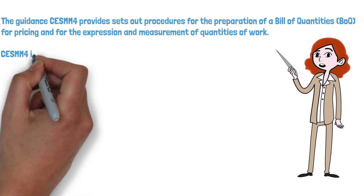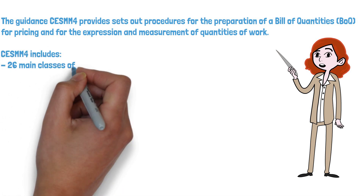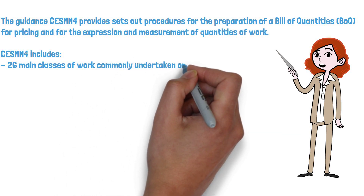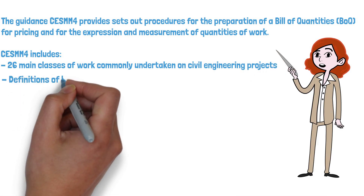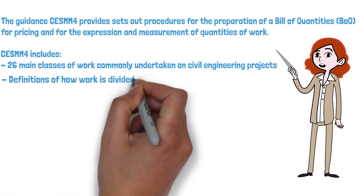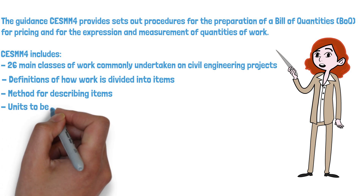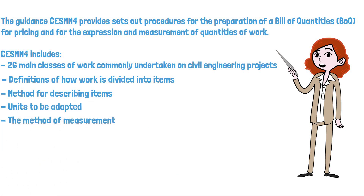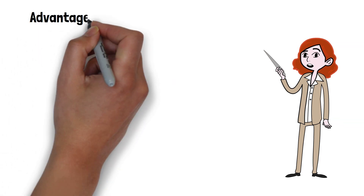The classification system in CESMM includes 26 main classes of work commonly undertaken on civil engineering projects, and includes definitions of how work is divided into items, the method for describing items, the units to be adopted, and the method of measurement. These are all extremely useful tools for quantity surveyors and construction professionals during the takeoff and tender process.